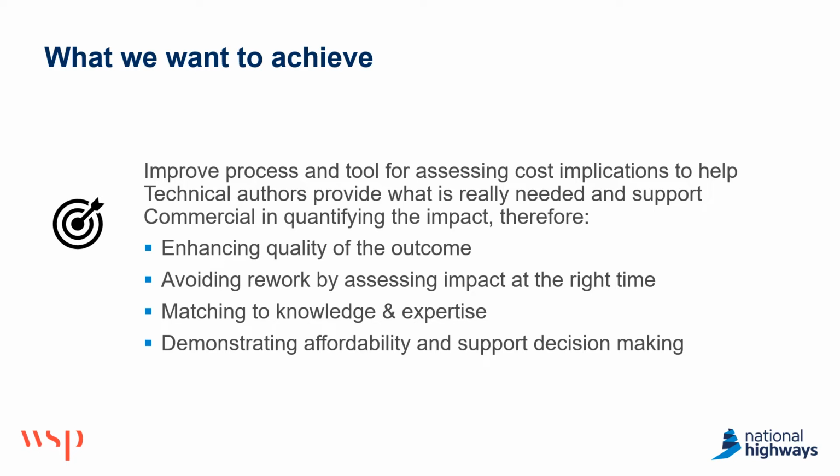Based on a consultation that we did last year with selected technical authors, there was a clear message that technical authors can provide detailed technical knowledge on the change and its implications. However, detailed commercial considerations should be assessed by experts in this field, hence the commercial input and the input from other directorates who are best placed to comment on contractual and commercial aspects. Ultimately, through this enhanced process and tool, we will be able to better demonstrate affordability and support decision making.